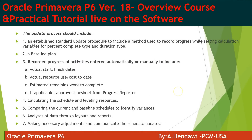The update process should include an established standard update procedure with the method used for recording progress. You should have the baseline plan — this is your reference, the one you use to measure delays. Record progress of activities entered automatically or manually. Add actual dates, add resources, estimate the remaining durations. If applicable, approve the timesheet. Calculate the schedule level and level resources — you can do this to check spikes in the resource. Compare the current schedule to the baseline to identify variances, analyze the data, and make any adjustments.